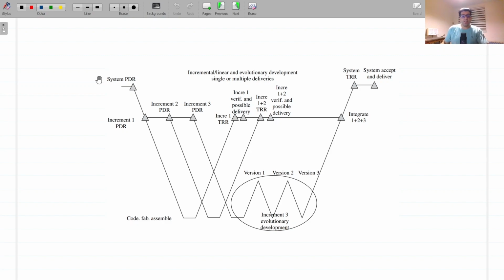By incorporating the stakeholders into the working level teams, the project receives continuous feedback that they are going in a direction that satisfies the stakeholders' highest needs first. One downside is that reactive project management with a stakeholder that often changes direction can result in an unstable, chaotic project. On one hand, this approach avoids the loss of large investments in faulty assumptions. On the other hand, emphasis on a tactical viewpoint may generate short-term or localized solution optimizations.